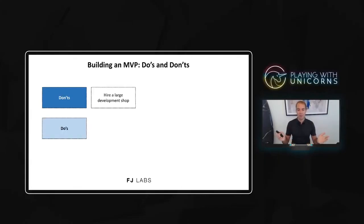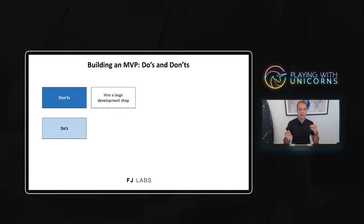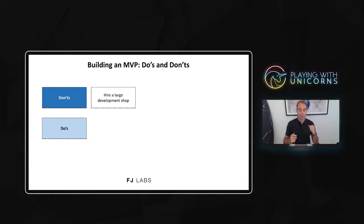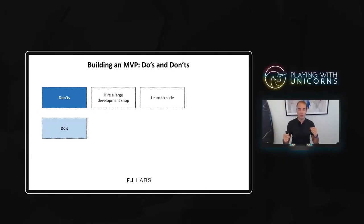There are amazing development shops out there — Accenture is at the really high end, and others like Globant. Any change requests you do with people like that would require a change order form, and each change order form would add delays. So it's not appropriate for iterating very rapidly when you're in the early stage. Not to mention that their costs are really high.